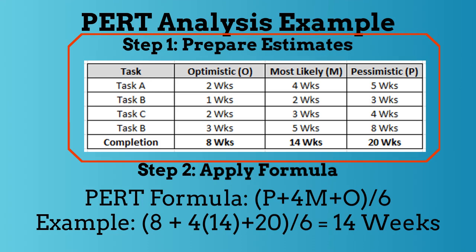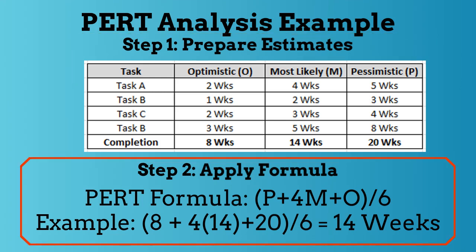There are four tasks on the critical path on this project. Once these estimates are developed, you can go to Step 2, where you add the total estimate for optimistic, most likely, and pessimistic to the PERT formula. The formula will then calculate the minimum time required for the project. The minimum time for this project is 14 weeks.